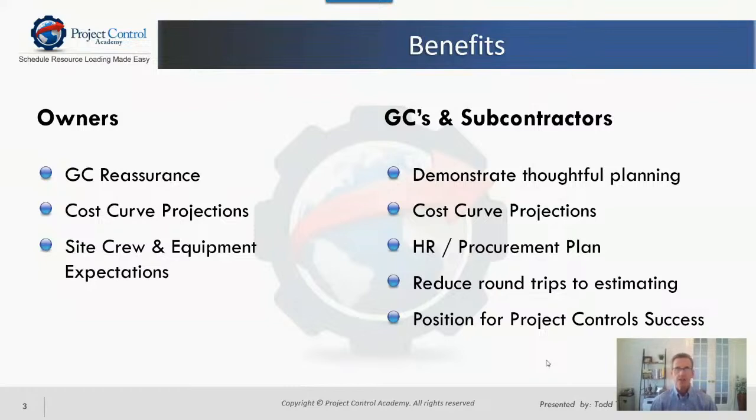And then, as Sheree alluded to, this sets up for really project control success, right? Because if you achieve this, you're kind of halfway there, because then you've got the plan, exactly what activities, hopefully with the quantities included, and essentially when they're going to be installed and at what rate and the costs that go with that. So you basically have your plan value. And so now it's just a matter of tracking actual installed quantities and actual costs, and you essentially achieve earned value.